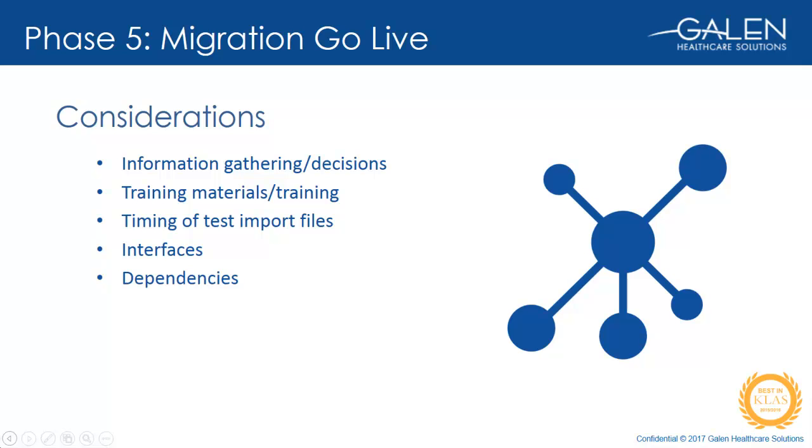So discussion with the client about how they plan to assimilate the migration data into their target environment is important. If, for example, the data will require some reconciliation once loaded, then perhaps the client would like to consider having the data loaded in advance of the go-live, giving some kind of lead time for that work to take place. As part of go-live planning, it may be important to bring in vendor representation as well to work out some things such as cutover plans, for example, with the results.